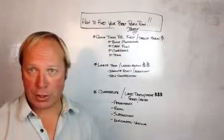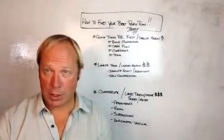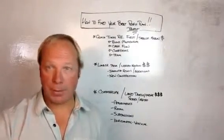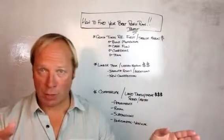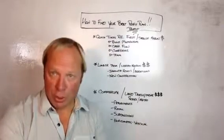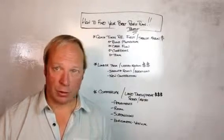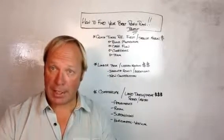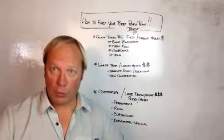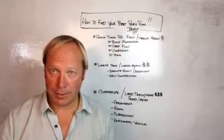So what I'm talking about there is you take land, you rezone it, and when I say you rezone it, for maybe mixed use, some residential, some commercial. You put a PUD, a planned unit development, together, and then boom. You go ahead and do your horizontal, your roads, your storm drains, your water, sewer, electrical, everything else. And then once you have all of that established, then you can go vertical construction, which is building of the homes, the commercial, and go from there.